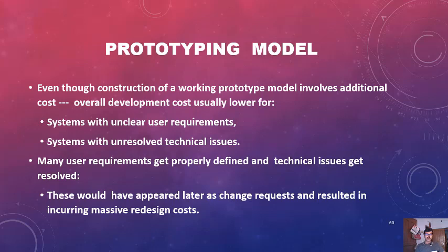Yes, it is, but the overall development cost becomes lower because the systems with unclear user requirements are cleared at the first. Systems with unresolved technical issues have been solved at the first of the project. Many user requirements get properly defined and technical issues get resolved. This would have appeared later as change request and resulted in incurring massive design cost.